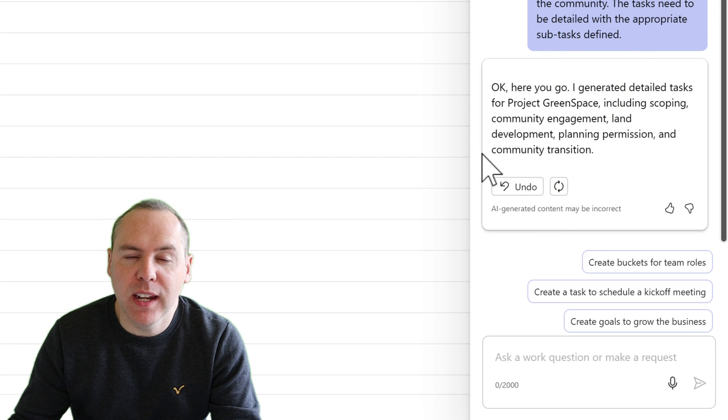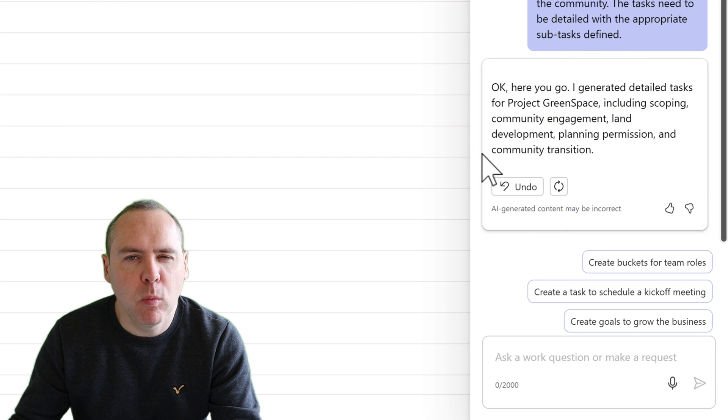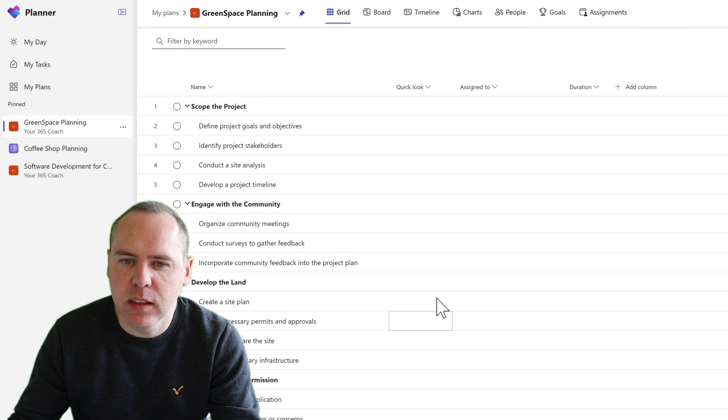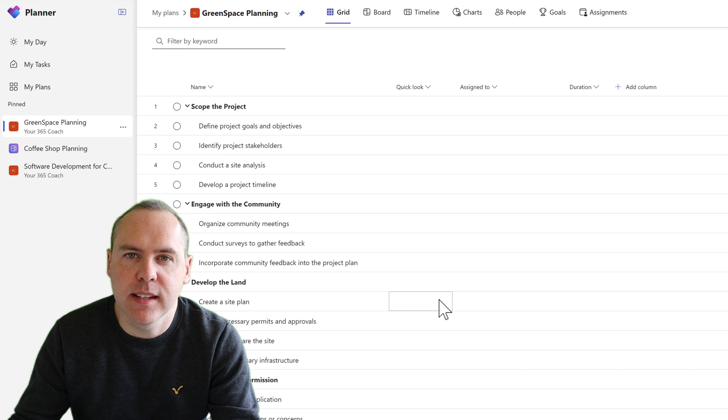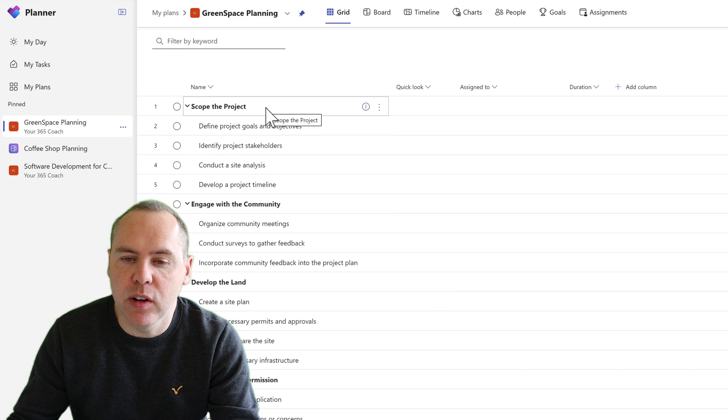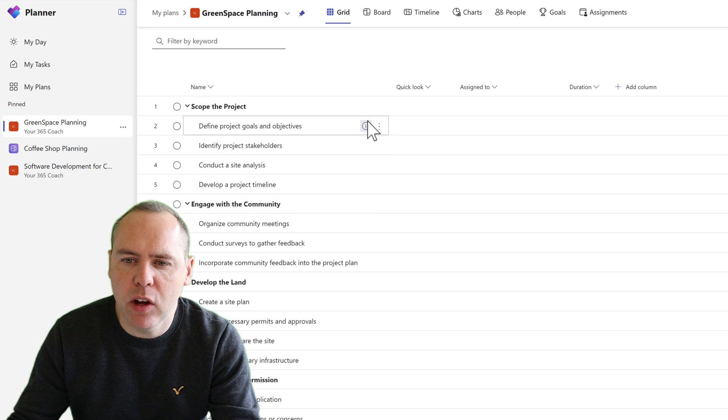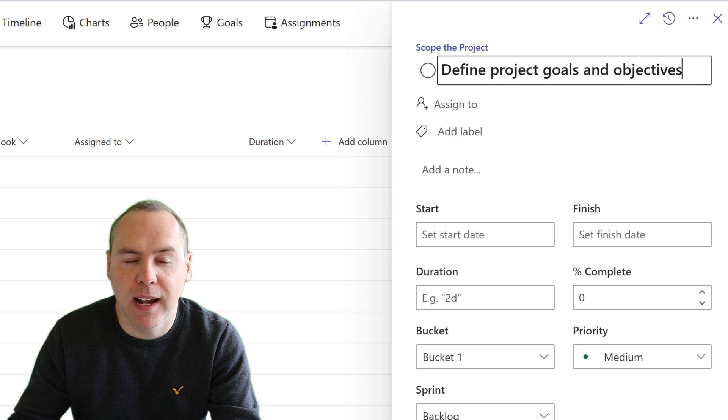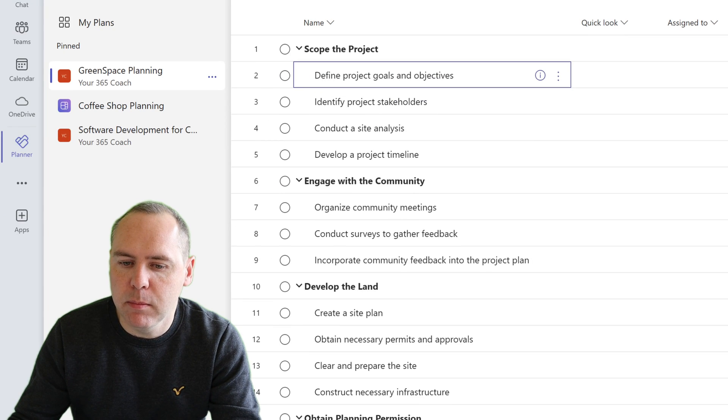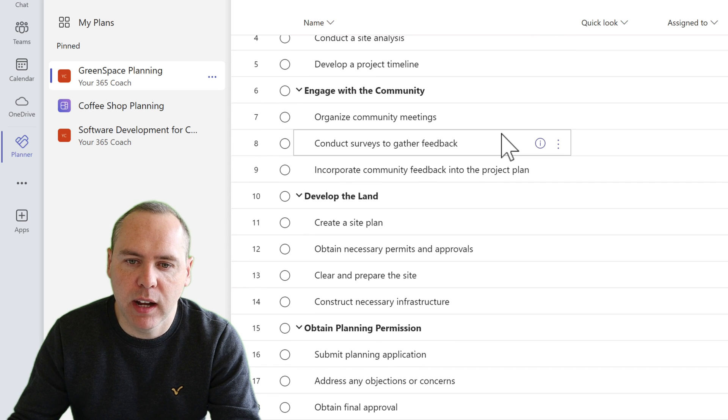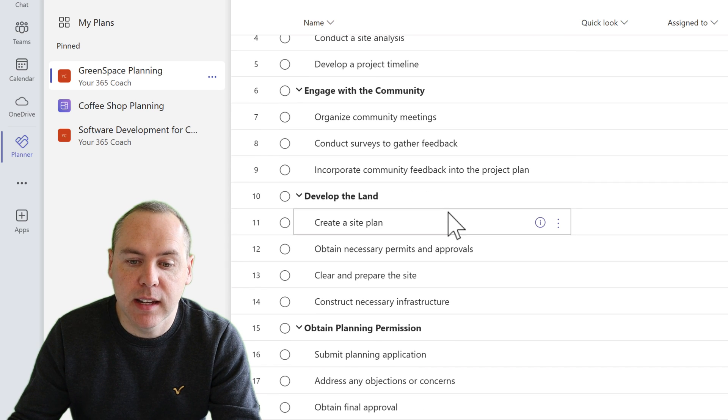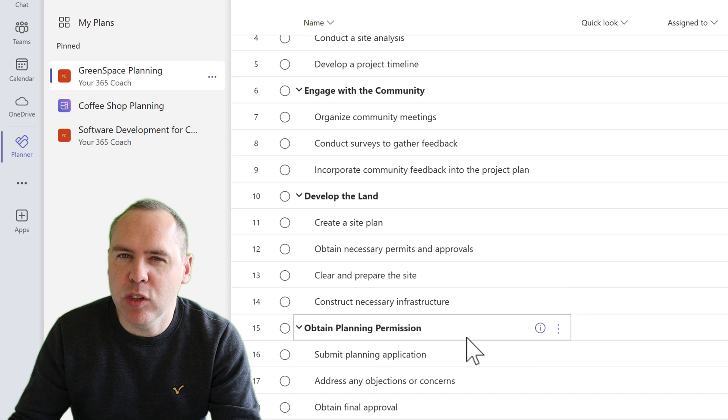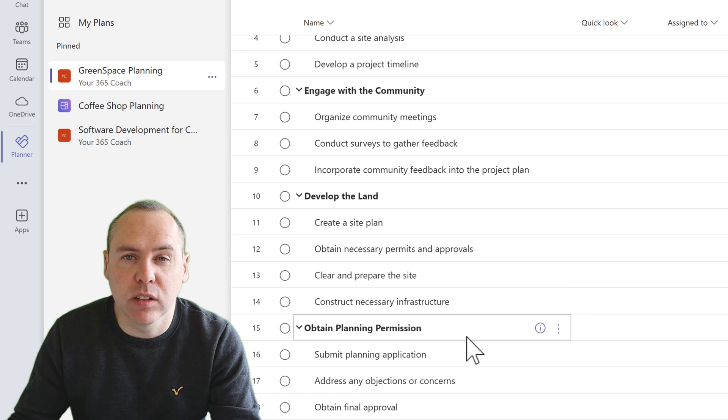And there we go, we can now see Copilot has responded confirming it's created all of those tasks, but what has it created? On the left hand side as we can see, the project plan has now had a number of tasks and subtasks inserted within it. You can see here we define scope the project and then have relevant tasks under that. If we open each of these tasks we could add further detail including the durations and who the resource has been allocated to to complete those tasks. But also as we scroll down we can see additional areas: engage with the community, develop the land, planning permission and transition to the community. We have 22 tasks here but it's a good start.